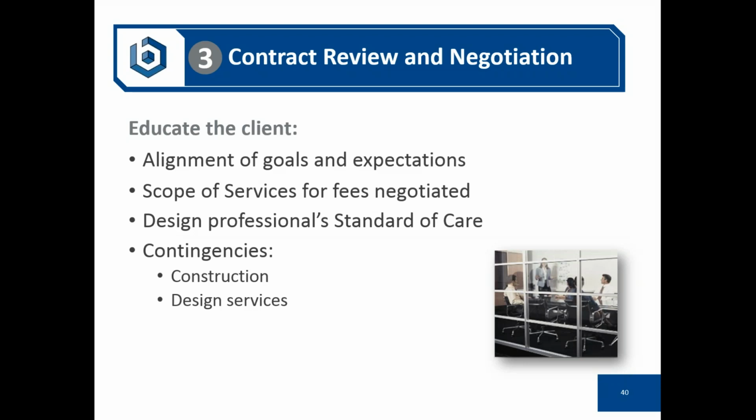We used to recommend to our clients have a 10% of the design services budget assigned for potential additional services that the client would ask for, and that you as the architect and your engineering consultants would provide. So contingencies throughout the project. Also very important are the client responsibilities. The AIA agreements do a very good job in defining what client responsibilities are.